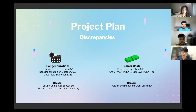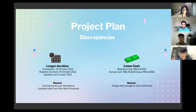The reason for the one-day delay was that there were some over-allocations, but we managed to resolve them. We also updated tasks from the client, which included the invoices list. The second discrepancy is lower cost — our baseline cost was RM23,050 and our actual cost is RM20,600, meaning we are under budget and saved approximately RM2,450, because we assigned resources efficiently within the team.